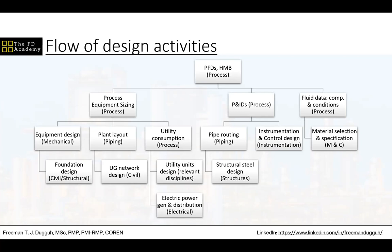For example, if in the design there is supposed to be an equipment foundation somewhere, but during construction it is realized that the equipment foundation was cast in a slightly shifted position from where it is supposed to be. A foundation is usually quite expensive. So instead of removing the foundation and recasting it, the field engineers might be responsible for redesigning the piping that is supposed to connect to the equipment that will sit on that foundation. A reorientation of the equipment. It is cheaper to do that than to recast the foundation.